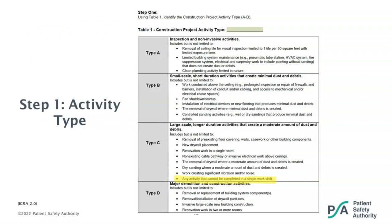This is what step one of the tool looks like. As you can see, they go into detail with examples of each type of project. Type A covers the most basic projects, including removing a ceiling tile for visual inspection, all the way up to Type D, which includes renovation work in two or more rooms and new building construction. It's also important to point out the highlighted section in Type C: any activity that cannot be completed in a single work shift is automatically classified as Type C. I've had projects I may have considered Type B, but had to classify them as Type C based on project duration.